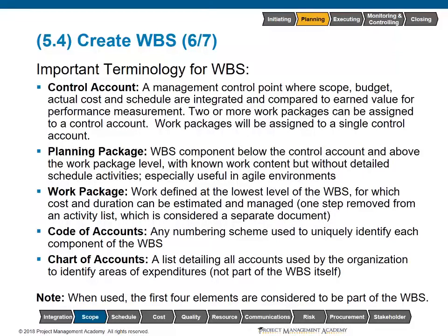So some terminology, and I will really stress the terminology here because this really does become a make or break type of situation for the exam. Some of these terms sound very similar, but they cannot be used interchangeably. So a control account, this is a point that we establish on the WBS. Now, we define where the control accounts go as part of our cost management plan.